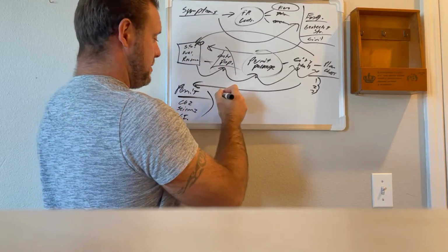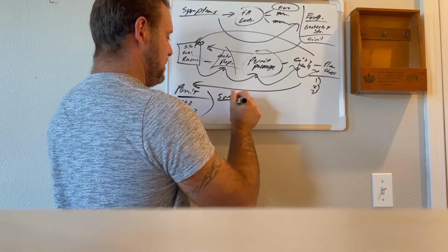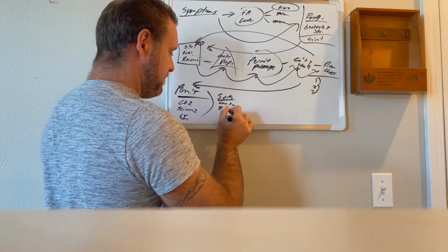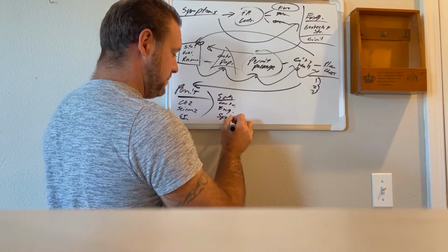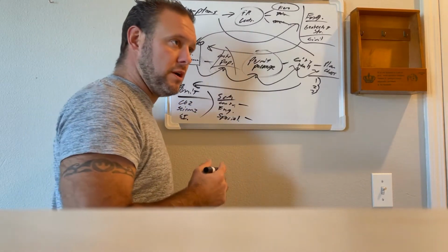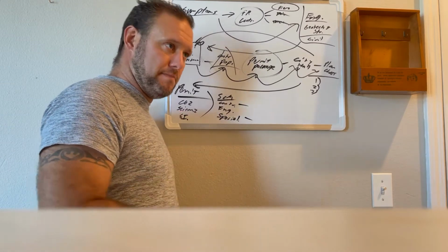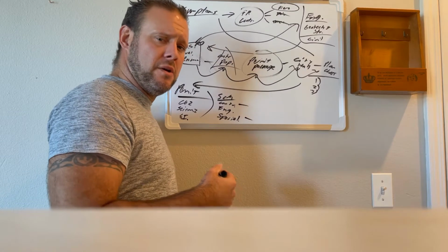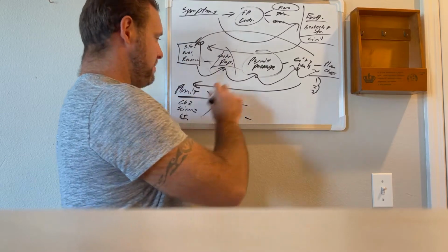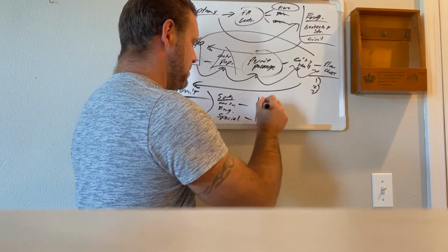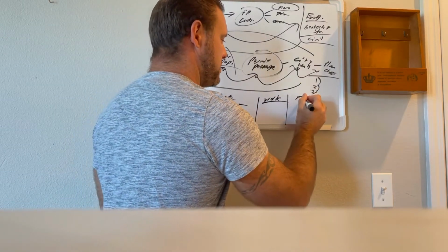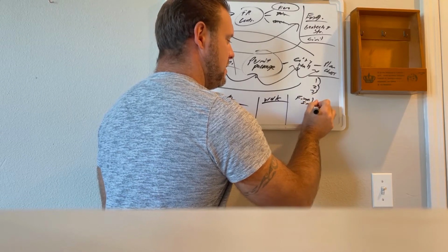So once you get the permit, schedule the start date. Schedule means contractor. If there's a structural observation, it means the engineer. It means the special inspector. Everyone needs to know when the start date is. The contractor will coordinate with the special inspector or the engineer as far as what's actually required for them to be there. That way you're not paying extra money out the yin-yang because you have a special inspector there who's not doing anything for a whole day, right? So there's that. Once that happens, you do the work. Yay. At the end of the work, call for the final inspection by the city.